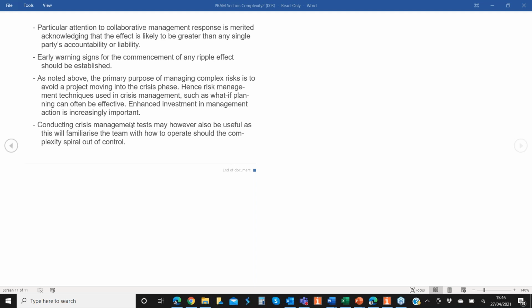I think the ability to terminate threats, or the ability to convert or terminate. Is there something as well here about, because of the complexity and probably the scale of this, that you may have to make decisions to accept maybe suboptimal elements for the greater good? Because sometimes you don't always deliver everything you were planning to, and you end up with the business having to take on workaround processes or something else. But that still needs to be discussed and decided, to give them something less than perhaps was the ultimate aim, because that enables you to deliver on time, or to deliver the wider program.